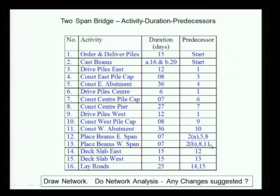My beam should be available, the east abutment should be ready, and the center pier should be ready. For the west span, my beam should be available with the center pier and west abutment. Deck slab east is based on the east beams; west is based on the beams in the west. Then layer roads after the east and west deck slabs are done. This is a finish-start relationship predecessor.